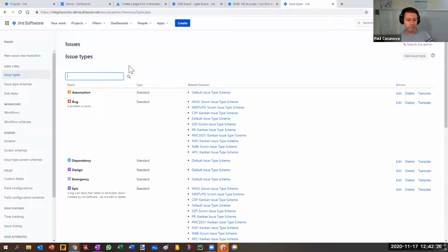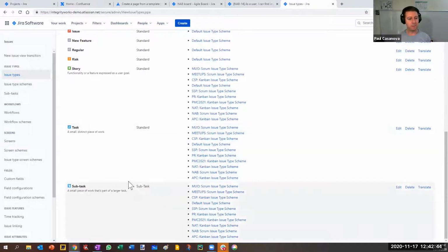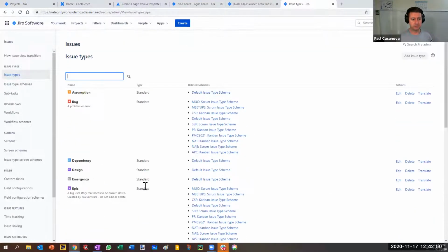Okay, so with issue types in Jira, out of the box, if you don't have Jira Premium, it's Epic, and then there's an issue level, which could be tasks, issues, bugs, all that sort of stuff. They're all at that middle hierarchy level, and then subtasks are beneath that. So we've got one configured here, subtask, which is of type subtask.